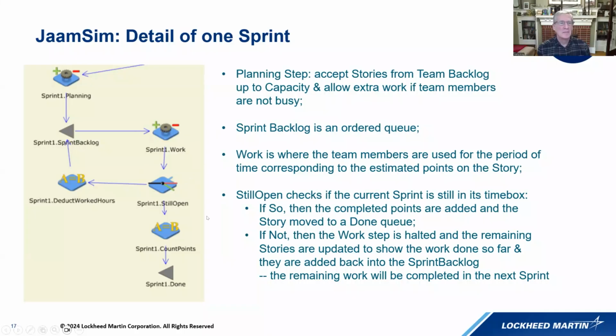But then when you add in various corporate interruptions and the effect of blockers, when things are not available when they need to be, that's where you start to see productivity impacted, because they're taking more time to complete the same work. And when work carries over to the next sprint, there are some inefficiencies associated with that, like context switching. There's scope for interruptions, and that's where you start to lose real productivity, not just measured productivity.